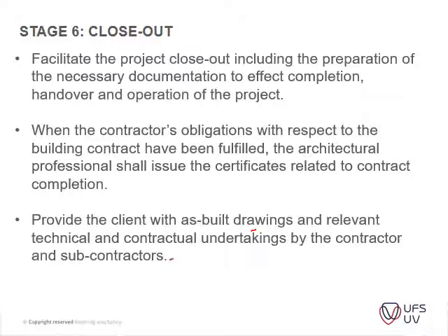Usually it's like an occupation certificate that's issued, depending on what type of project you're busy with. If it's a public project for government, you would have an occupation certificate, like for instance your health and safety or your health inspector will come and inspect your building. They will ask, is this the structural engineer sign off on all the SABS documentation, is the electrical COC in place, etc., etc.